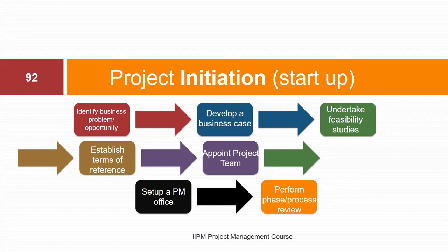Then from there, we appoint a team. And then from there, we set up a project management office, which could be in a physical location or a virtual collaborative shared network. Then from there, we could perform a phase gate or phase review. I'll repeat this again. It's a simple process.